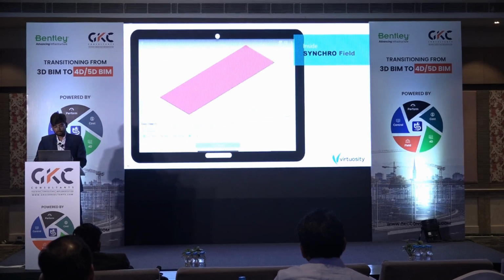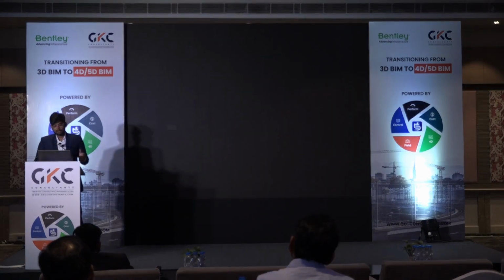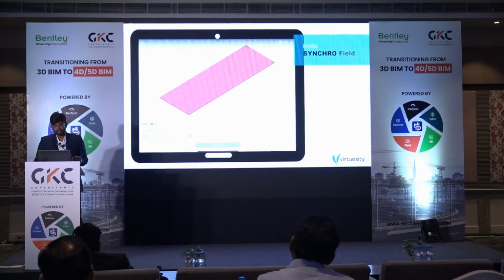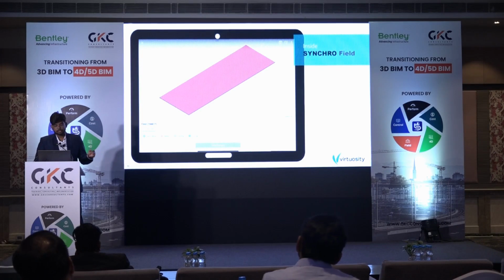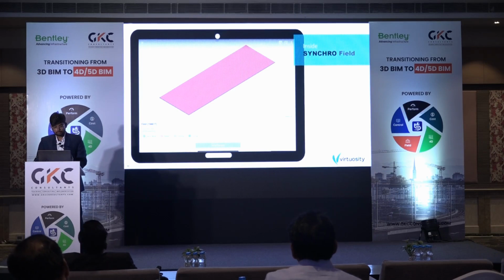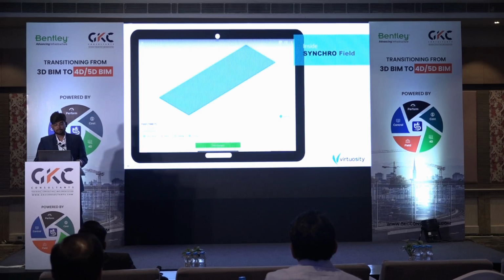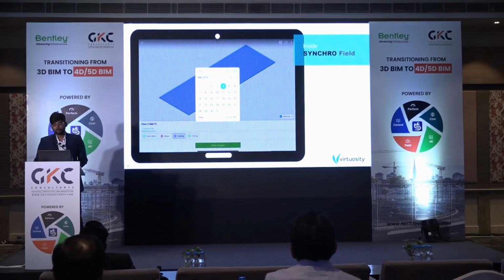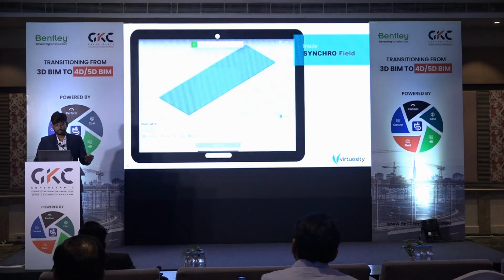But the best way is that we can start saying the progression report. So here from the mobile, we update the resource status. We say that this particular slab, for which the formwork was previously completed, now has the rewiring done. So here we change the status. Now the casting has been done, and we say when the casting was completed. These are the milestones that we have for a particular task, and we update the milestone, the date, and the time it was completed.